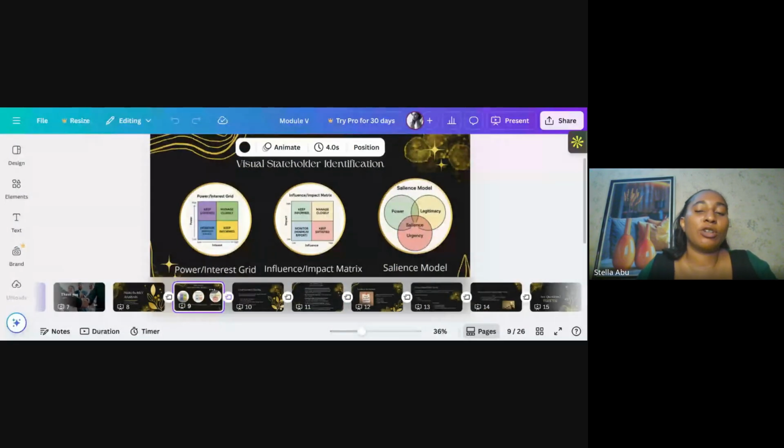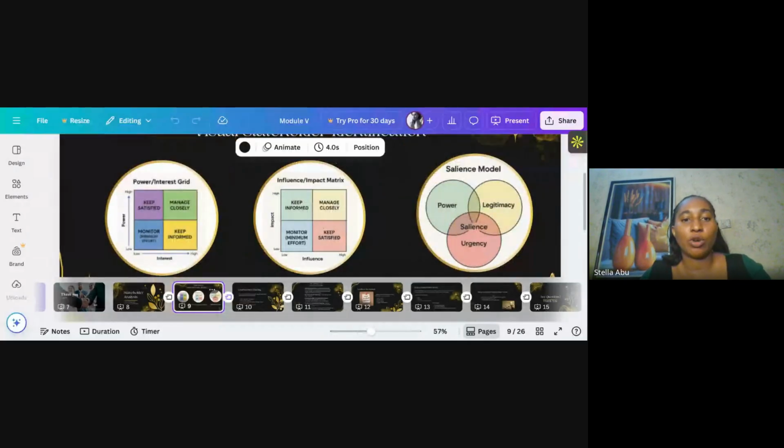Yes, you have an idea of what was discussed, but what I really wanted was, who are you supposed to manage closely? Who are you supposed to keep satisfied? Who are you supposed to keep informed? And who are you supposed to just monitor and say, okay, this person is really not as important as I thought the person was, right?